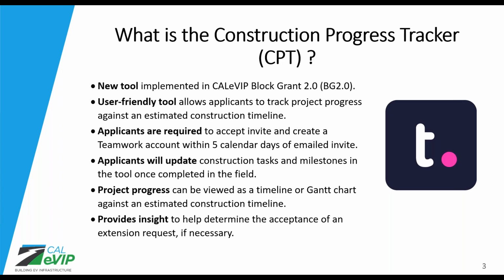As I said, it's a user-friendly tool that allows applicants to track their project progress against an estimated construction timeline. We've basically created the ideal, perfect-world timeline for your project to proceed at, and you can update tasks and major milestones as they happen in real time. Applicants are required to accept the initial invite to Teamwork, which is the platform that the CPT runs on, within 5 calendar days of getting the invite. So for Block Grant 2.0 projects, you will get your initial funds reserved announcement, and within 48 hours of that, you'll get an email from Teamwork, and we are requiring that you sign up within 5 days.